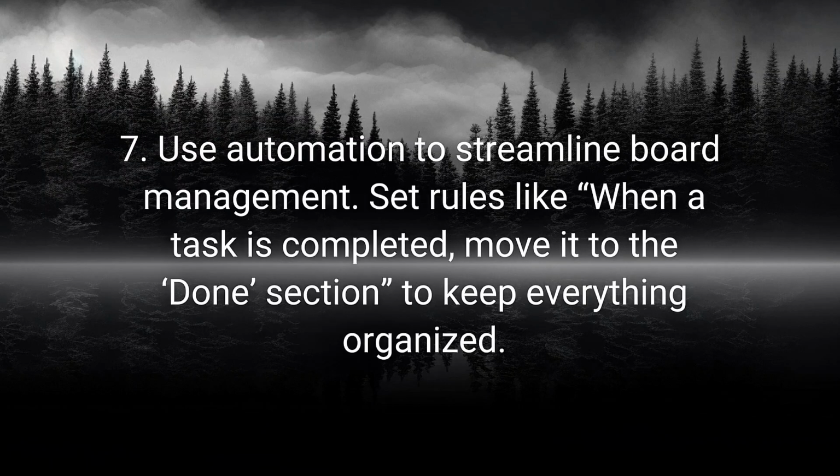7. Use automation to streamline board management. Set rules like, when a task is completed, move it to the Done section to keep everything organized.